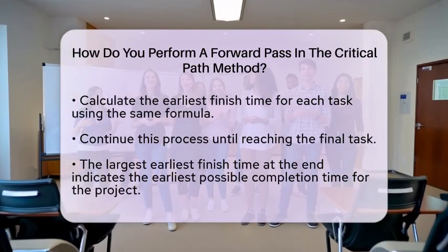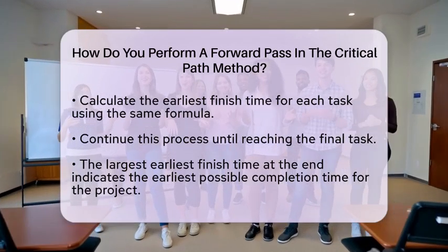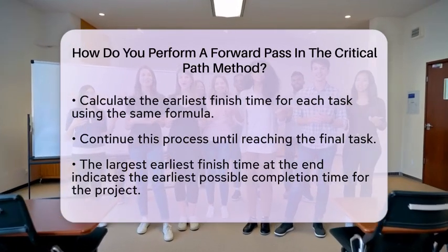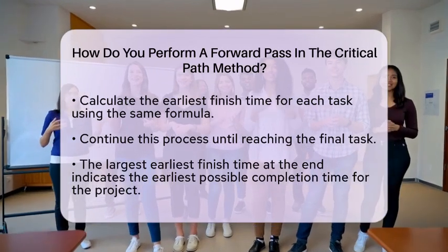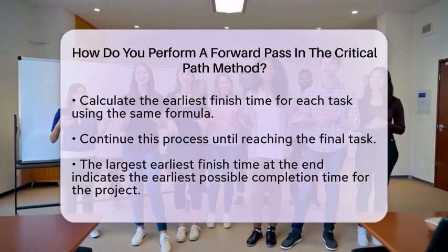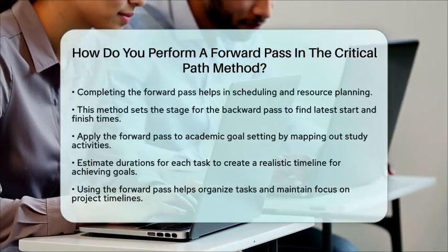This is essential for scheduling and resource planning. It also sets the stage for the next step, which is the backward pass. The backward pass will help you find the latest start and finish times for each task and identify any slack or float in your schedule.